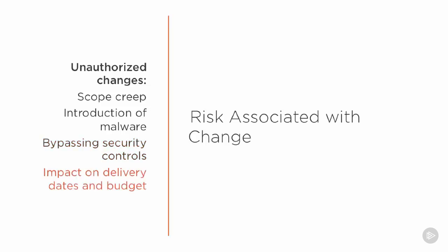We should review every change for its impact on delivery dates. Going back to the idea of the iron triangle, we cannot change the scope, the schedule, or the budget without changing the other two factors.